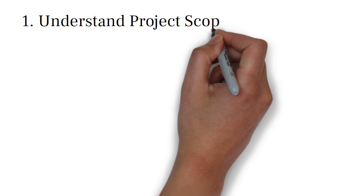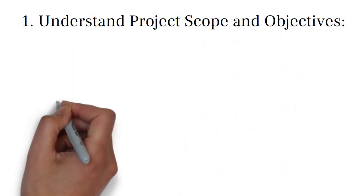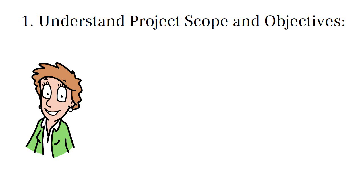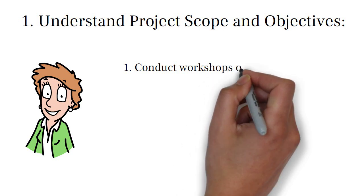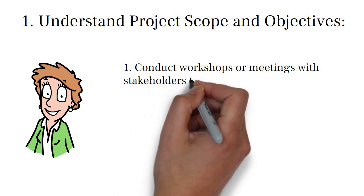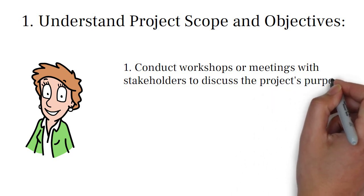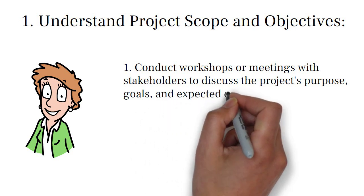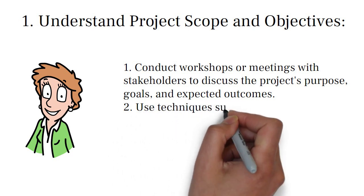The very first part is understanding the project scope and objectives. You have to clearly define the purpose and goal of the project, and also identify the key stakeholders and their expectations. To do that, you'll need to conduct workshops or meetings with these stakeholders to discuss the project's purpose, its goals, and its expected outcomes. You should also use techniques such as brainstorming, mind mapping, or SWOT analysis to explore various aspects of the project.